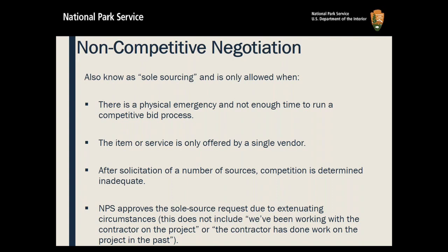But this does not include because we've been working with this contractor on the project or the contractor has done work with this project in the past. Those are not considered legitimate reasons for not having an open and free competition.